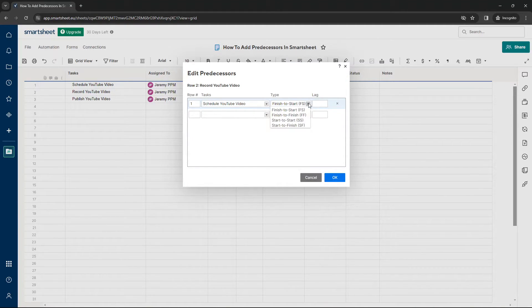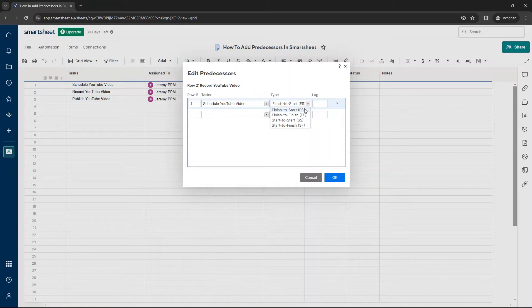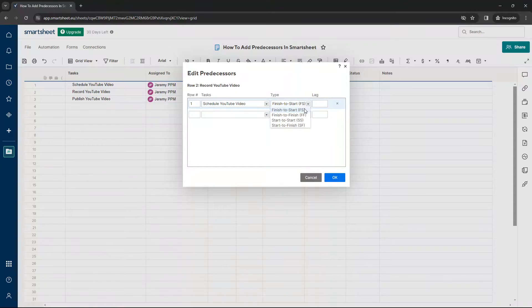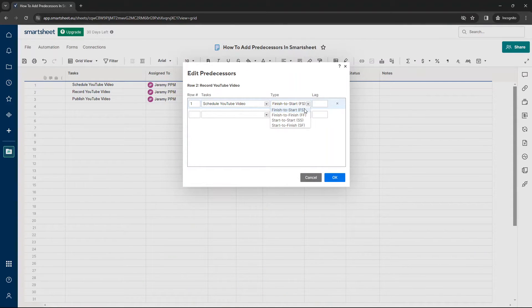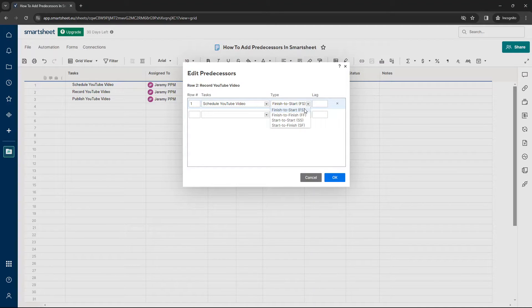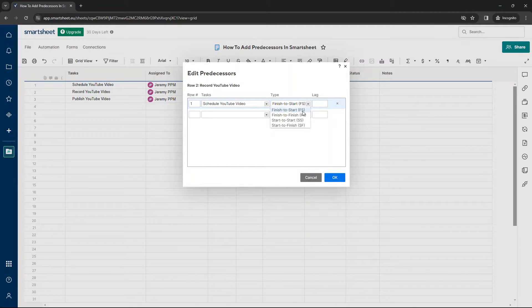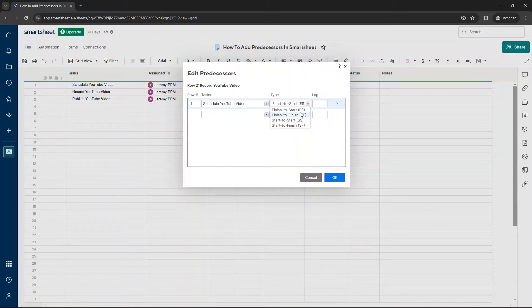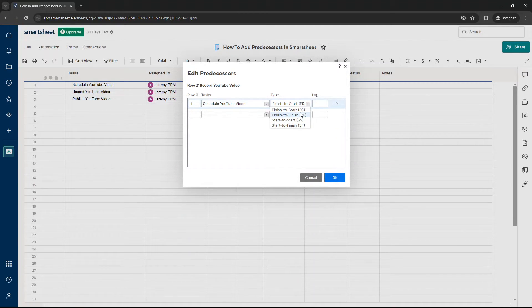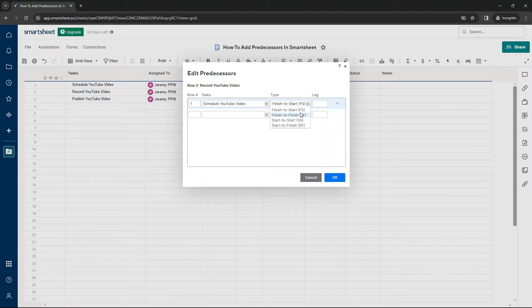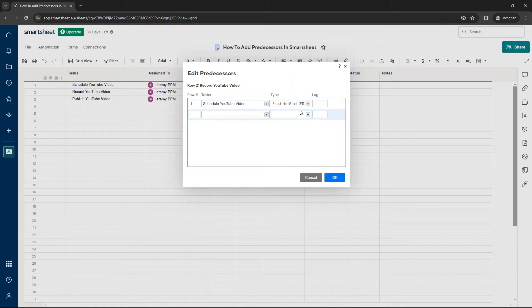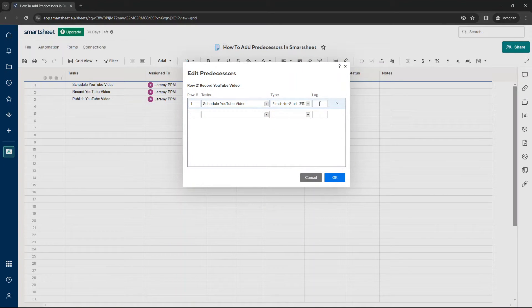Now, you have four different options to choose from. Finish to start is the main one. It's the one I'm going to be using in this example. So we can't start recording the YouTube video until the schedule YouTube video has finished. So I'm going to select that. But there are other options as well. If you're not sure which ones to use, you can always go into Google and type in predecessor types explained. But this is what I want to use in this example.